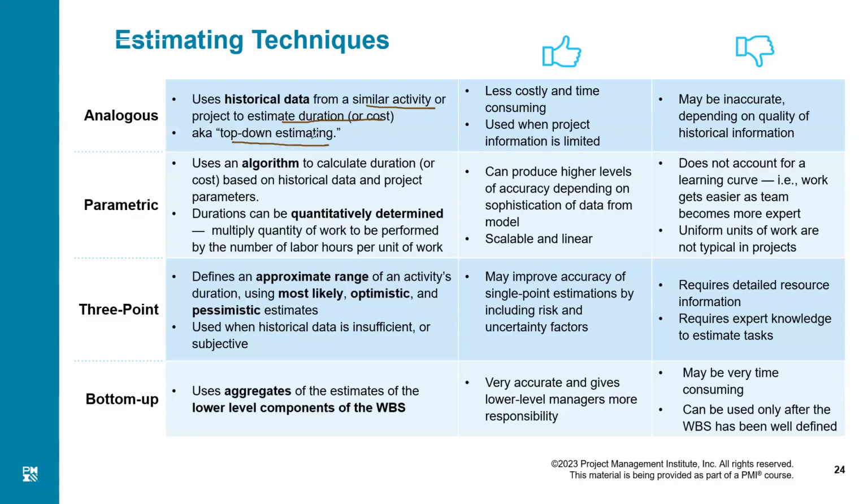By the way, this technique can be used in estimating the duration of an activity as well. I have an activity to do. I'll compare with the previous project, how long a similar activity took to finish, and I will estimate based on that. Why am I going for analogous estimation? That's the point.